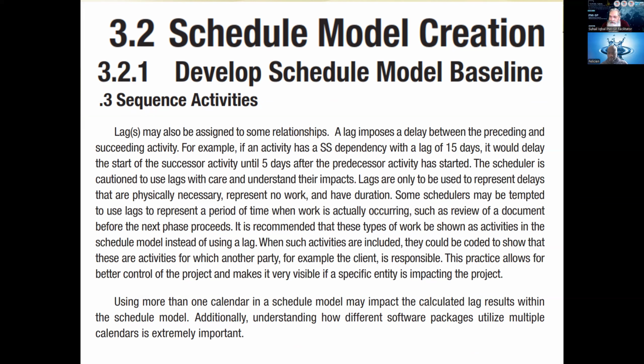It is their job. So put it in the chart that this is their job. Because if the project suffers due to the delay in approval, we would know that this is not our fault. This is the fault of the person who did not give the approval in time. So he would also know that I am on the critical path. I shouldn't delay it any further.